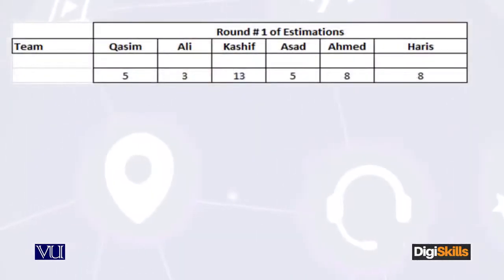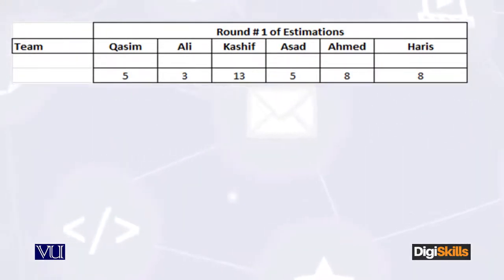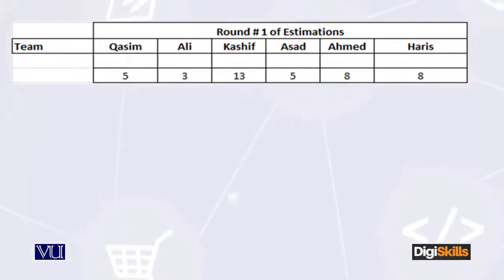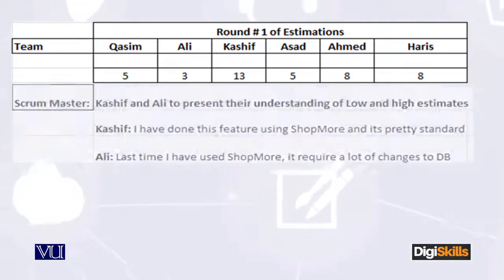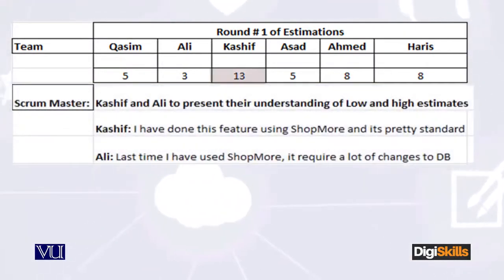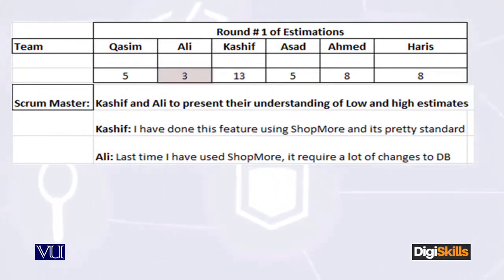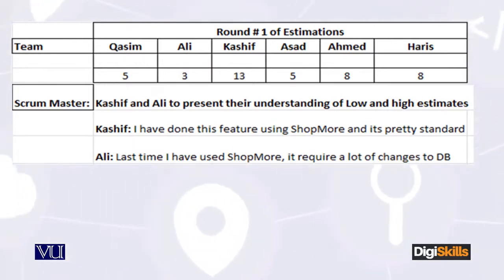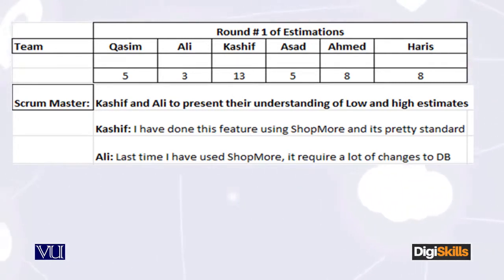For example, Kasim has estimated 5 story points, Ali has 3, Kashif has 13, Asad has 5, Ahmed has 8, and Haris has also given 8. This is the first round of estimation. The scrum master notices that Kashif has given 13 points and Ali has given 3 — the maximum and minimum. So the scrum master asks both to explain their reasoning.